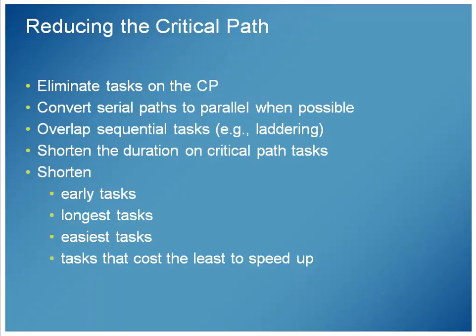So you have to look at every item on that critical path and say, is it really critical? It's critical in the diagram. Is it critical to the project? Can I remove it from the project and still be okay? If I can, it will decrease the time it takes for me to complete the project and get it to market and get the advantage of why we're doing this. Obviously, we're doing this project because there's some advantage to it, and more than likely, the sooner we get done, the better. Increase the advantage.